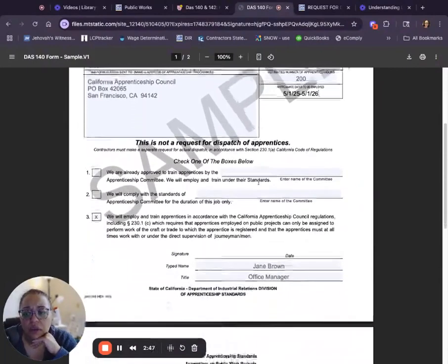So if we scroll down to the part where you have to choose a box, let me tell you what they're all for. Box 1 is if they're already affiliated with an apprenticeship program. So maybe ABC Apprentice Program said, we're going to let your ladies and gentlemen on the job site train them. Awesome. They're affiliated with one. Perhaps they're already union. And if they're already associated with the union, that's who you're going to put there, because you have to enter the name of the committee.